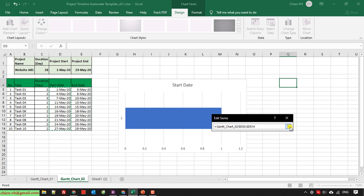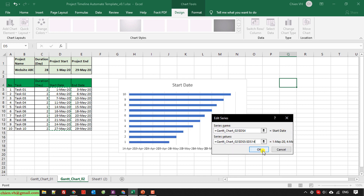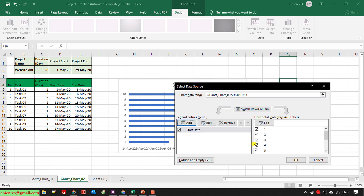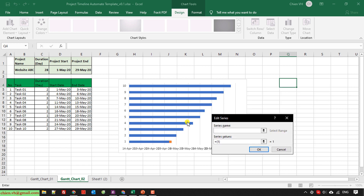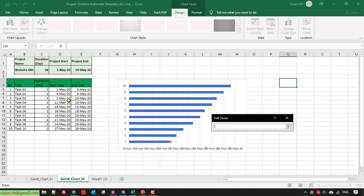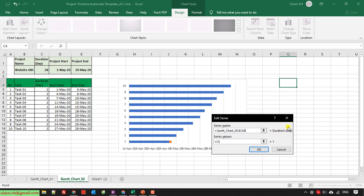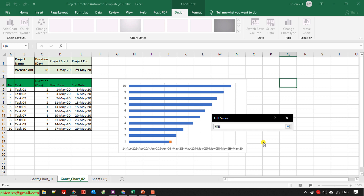Click the dropdown button and then click OK to finish the selection. For the next step, I will add one more series — I will select the duration. The series name will be the duration, and the values will be the data for the duration, from cell C5 to C14.